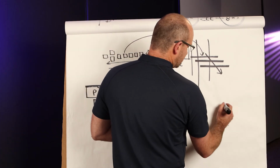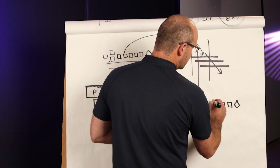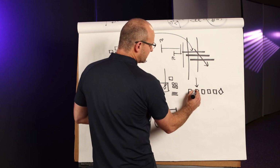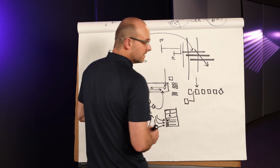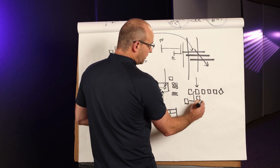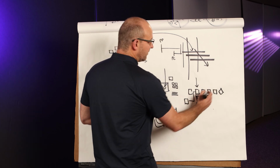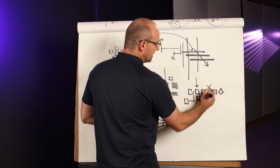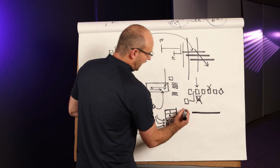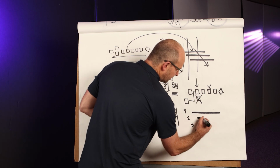When you see the sequence for the pull plan, and you see problems, you need to say something about it. So let's say this was your activity here. If there's another activity that needs to go in front of it, say something. If there's another activity that's being run concurrent and it's a problem, say something. If you see something with some other trades that doesn't involve you, but it's a problem, say something. And what you want to do is end up having a really nice sequence, and you want to help the superintendent and the facilitator come up with the right number of zones.